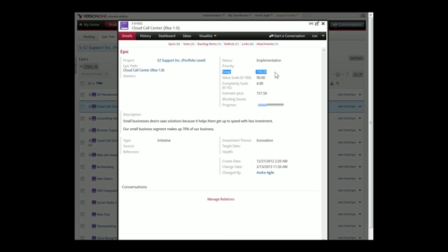So the swag value here, Mike had talked about, wanting to capture that budget. That's really the concept behind the swag. You're not going to have all of your stories created up front to understand, well, how big is this epic? As you go ahead and do your breakdown, you're going to eventually get a roll-up of the estimate for all the stories. And so this Release 1 project is something that's kind of a release underway. And so you may have all of your stories, or the great majority of your stories, already created. But when you first start out a release, you won't have this roll-up of the estimate points, and you do want to be able to understand as an organization, how big do we think this item is? And that's the concept behind the swag.